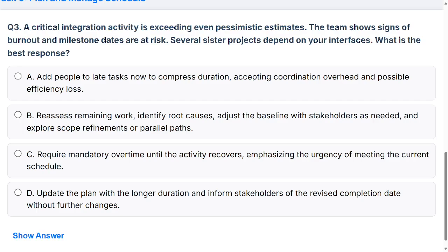You understand that in the world of project management, we have the PERT formula, 4 MOPS divided by 6. What do I mean by that? 4M plus O plus P divided by 6. 4 times most likely plus optimistic plus pessimistic divided by 6. And that gives you your estimate, right?